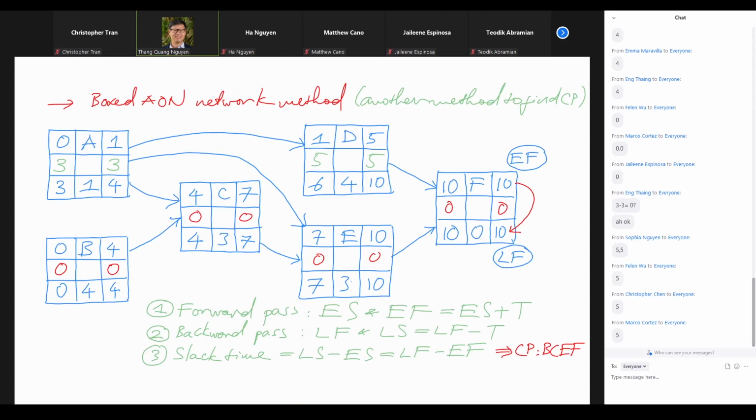As a manager, because it is a critical path, I would need to draw these arrows to designate it as the critical path. As a manager, we need to keep a very tight grip on the critical path so that we can keep this time window of 10 weeks fixed. A and D can be delayed to some extent. For example, if we need more resources focused on the critical path, then just try to keep the critical path on time. A and D can wait a little bit.